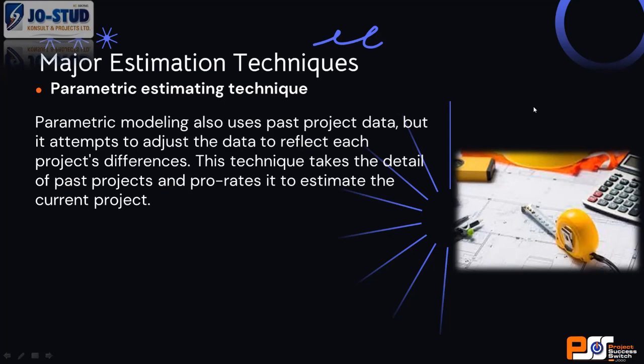So let me tell you something. If you do a duplex for 100,000 per square meter on one site, and you go to another site and do 150,000 per square meter, you should quiz yourself and want to know why. If there is a reason, I'm not saying it can't happen, but you should also know what that reason is. It's very dangerous for you to succeed without knowing how you succeeded. It's like luck. You just stumbled into it. So next time you can't repeat your success. You can't even predict your success. So parametric estimate helps you predict things when you document it, prorated from past projects. Let it be a practice. It will help us a lot.